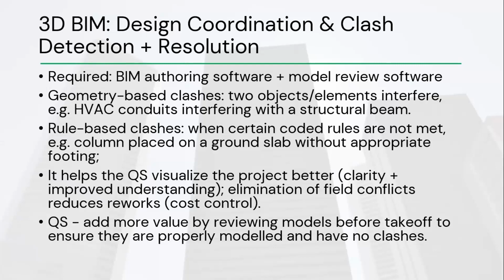And this is the model that is going to be used to perform clash detection and resolution of those clashes. We talk about clashes because in the model we have the architectural elements, the structural elements, and the mechanical, electrical, and plumbing elements. So if there is any conflict, maybe in terms of the graphical placement of electrical or plumbing elements with structural elements, that needs to be resolved first before we go to site.